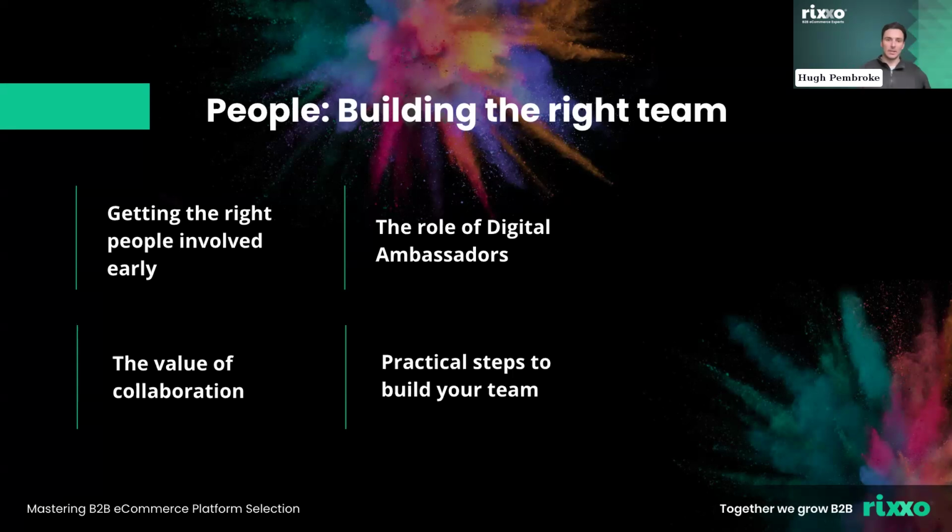The second part of getting the right team is the role of digital ambassadors. What we mean by that is champions in your organization that bridge the gap between people, process, and integration. The best example is during the project that I undertook, we really tried to have one of our digital ambassadors as a CX manager. They were involved with the project, not so functionally that they were creating documentation, but they were aware and part of the internal stakeholder groups. They got updates throughout the process on what was selected and why, so that when it came to launching the new site and their team was heavily impacted, they understood the context around why we've done this, why we made these decisions, and how we're going to solve them.